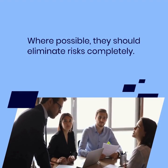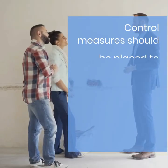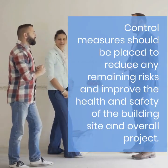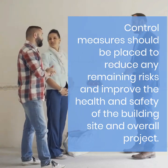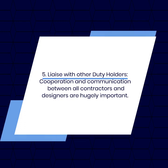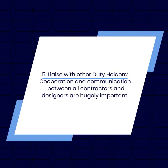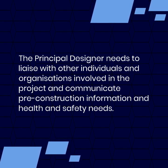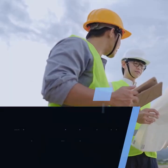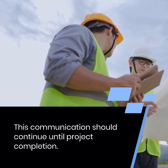Where possible, they should eliminate risks completely. Control measures should be placed to reduce any remaining risks and improve the health and safety of the building site and overall project. Fifth, Liaise with other duty holders: cooperation and communication between all contractors and designers are hugely important. The principal designer needs to liaise with other individuals and organizations involved in the project and communicate pre-construction information and health and safety needs. This communication should continue until project completion.